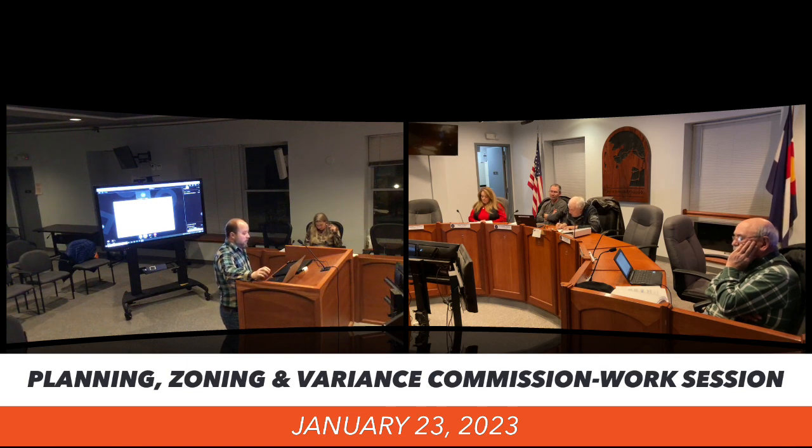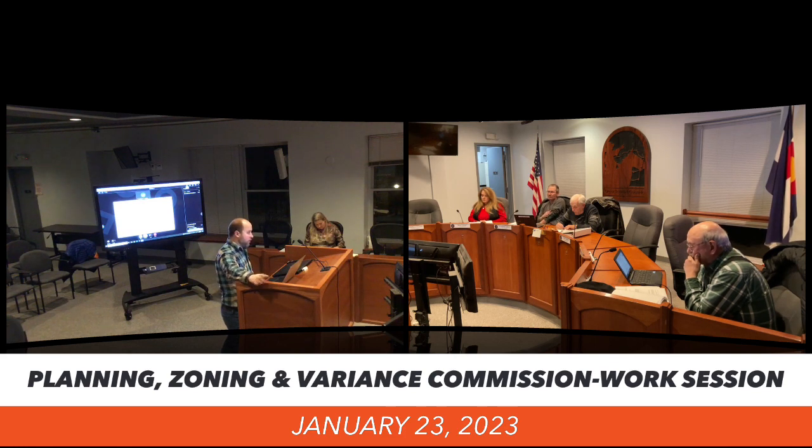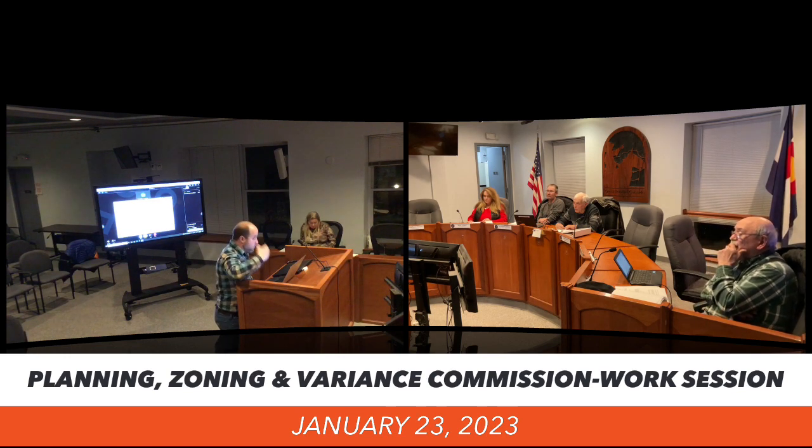Then we go through the limited impact review procedures, major impact. Steps following approval, that's really the filing of your development plan, public hearings. You'll see there's a table that basically shows what public hearings are required for what levels of applications. Concurrent review is a really important section. It's a very small paragraph, but it basically states if you have multiple applications, you can come in front of the planning commission once, and they can consider all your applications in one development plan.